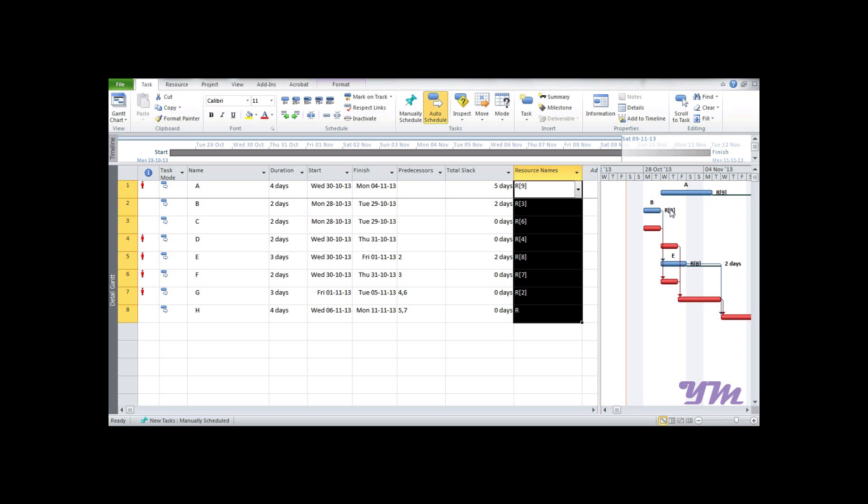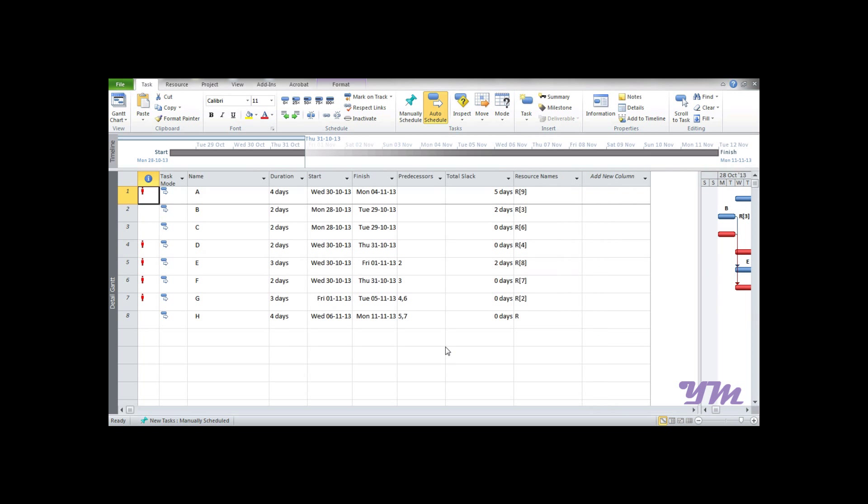The key points in assignment of resources: you should always enter resources from the Task Detail Form. Number two: please ensure you have always selected Fixed Duration. Also, please ensure you have not selected Effort Driven. These are the three main steps to keep in mind while assigning resources. Now let's begin with the second part - resource leveling.